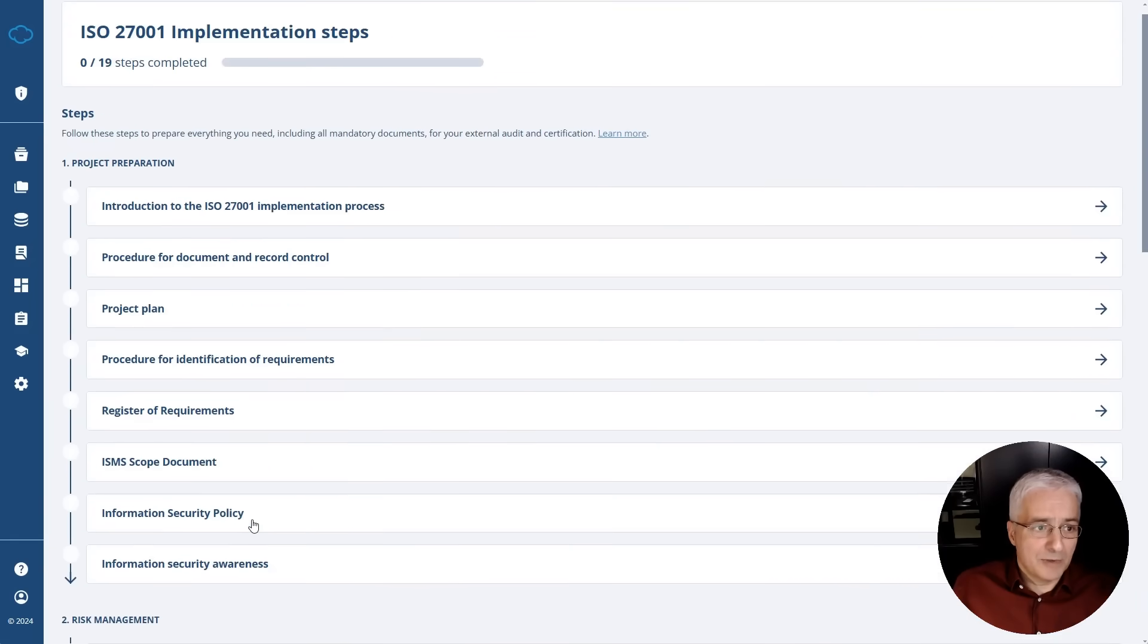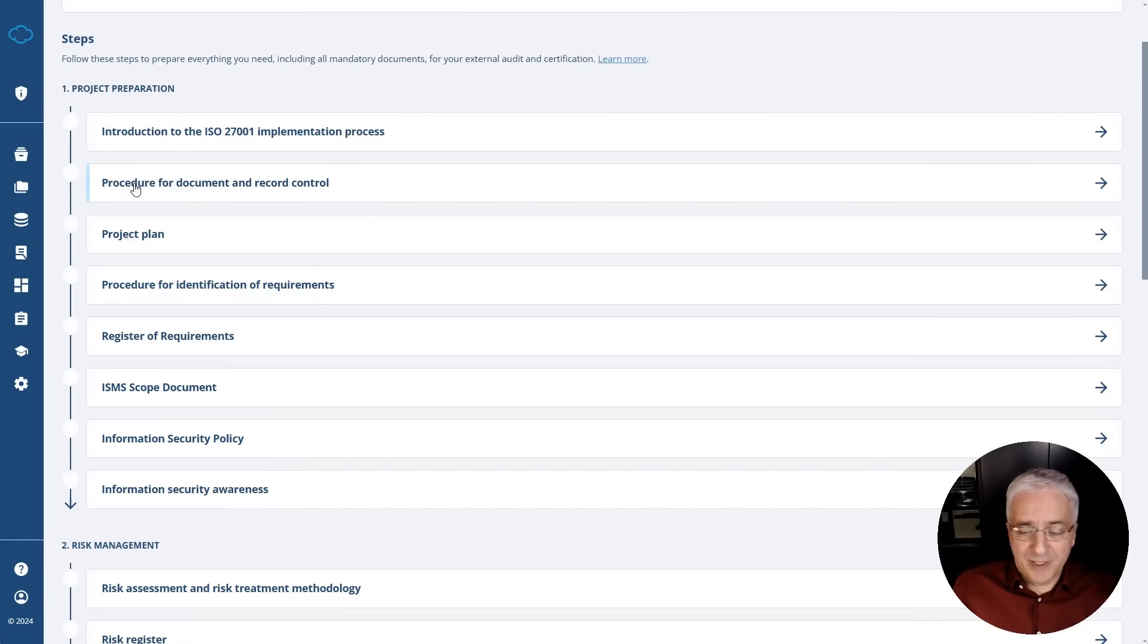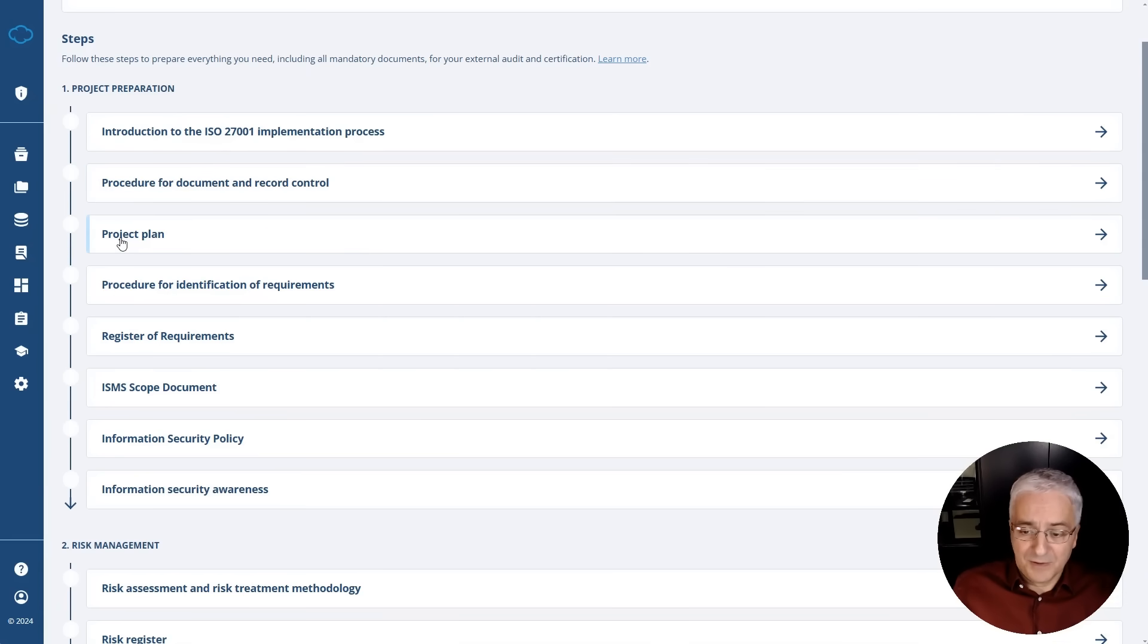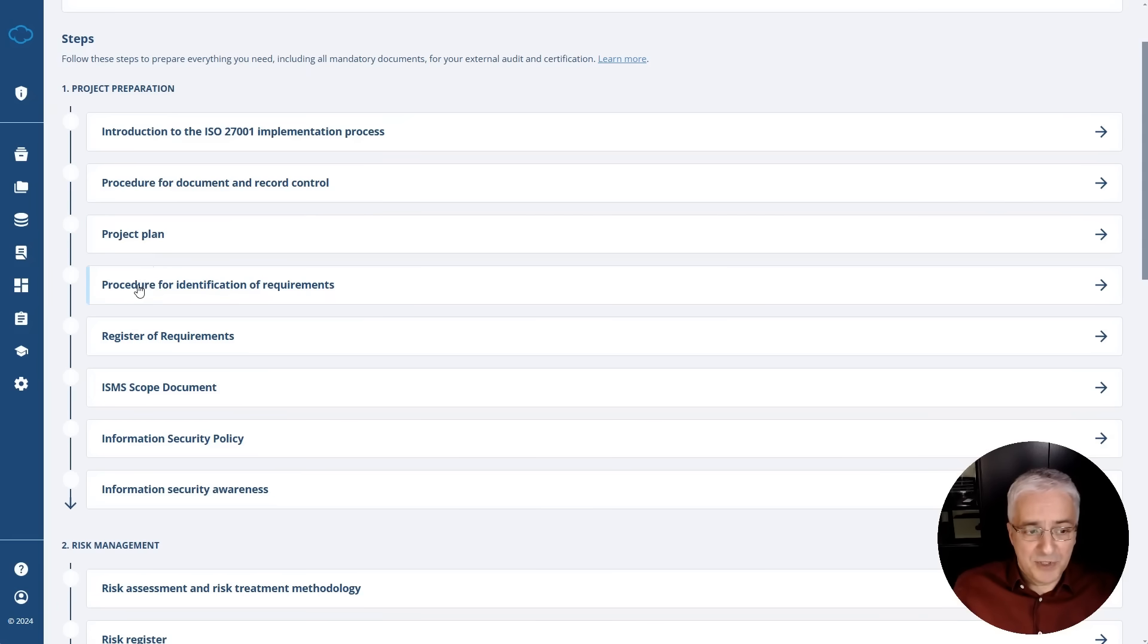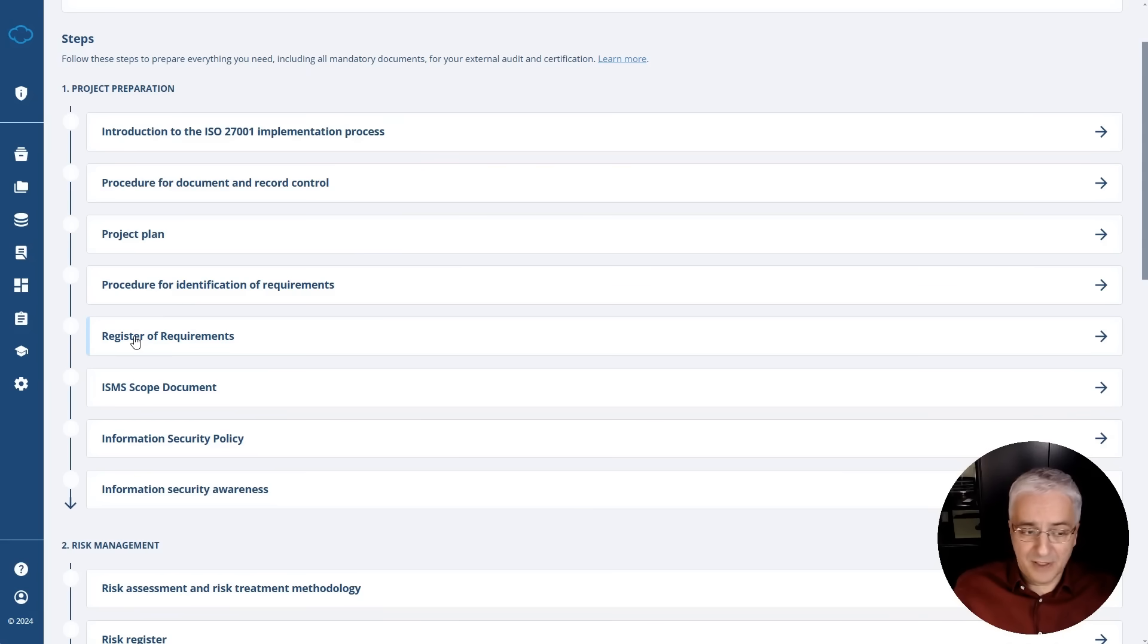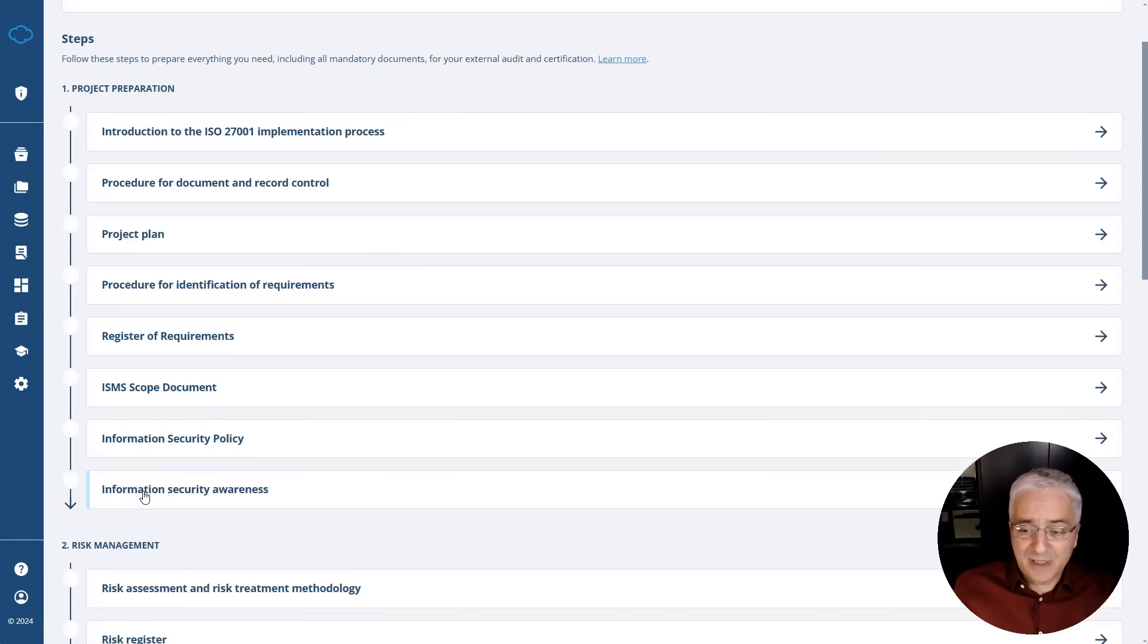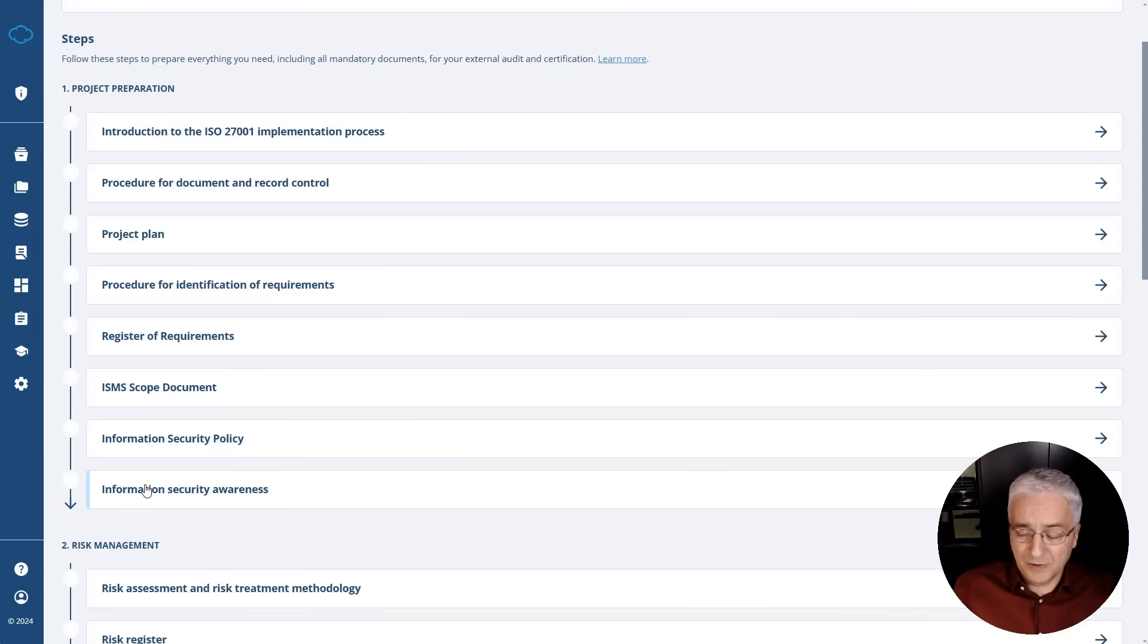Now, going back to the beginning. So the first phase of project preparation. First, there is an introductory video around the implementation process, and then you're setting up how you handle your documents, a procedure for document record control. Then you are setting your project plan, so basically who is the project team, who is the project manager, these kinds of things. Then a procedure for identification of requirements, so basically how you're recognizing your stakeholders and how you're listing their requirements related to your company. And then you have this register of requirements. This is where you list all of these requirements and stakeholders. ISMS scope document, where you define whether you're going to apply ISO 27001 for your whole company or part of your company. Then you're writing the top level policy. And then you do this first round of information security awareness for your team. So basically all of these steps are considered preparatory because you're still not doing the main steps as you will see in the phases two and three.